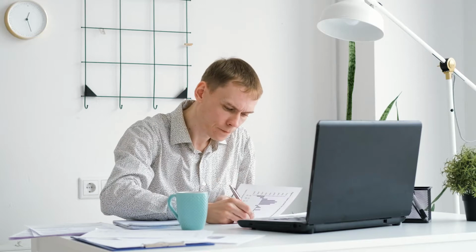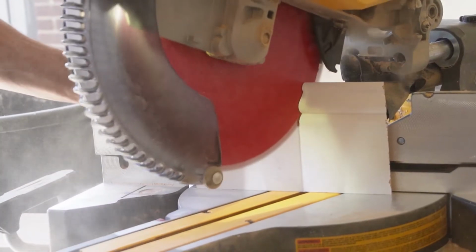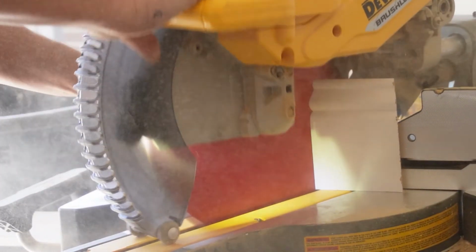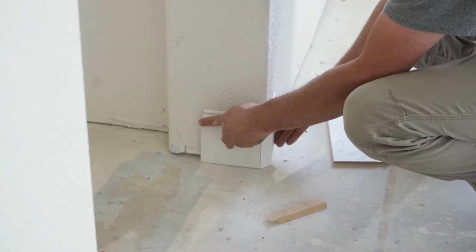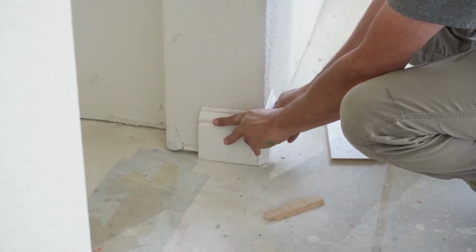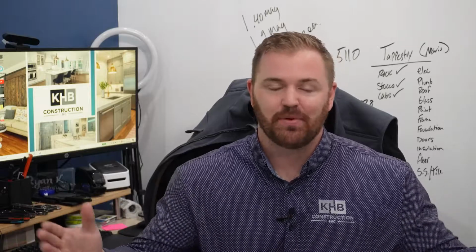So change order happens, it is accepted. We go through all of our construction operation paperwork and amend it to reflect that change order. So that way everyone in the field can get their updated transformation takeoff sheet. We can update BuilderTrend. We can assign the to-dos for the guys in the field so they can know exactly what this change order is going to reflect for their job. Ultimately, we need to change all of our scope of work, all of the change order documentation into field operation documentation so we can perform the transformation flawlessly and knock that change order out of the park.